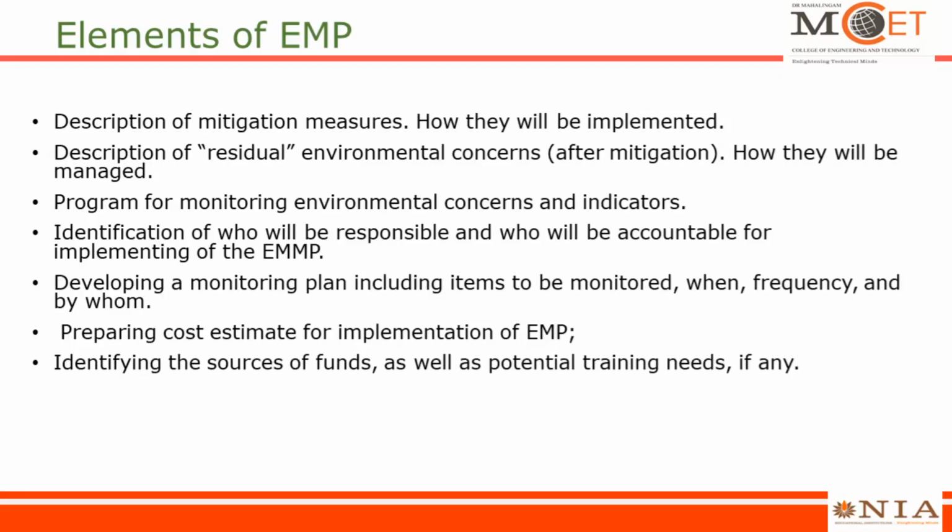Developing a monitoring plan includes items to be monitored, when it is going to be monitored, frequency, that is how often it is going to be monitored, right, once in a week or once in a month, and who is going to monitor it. Preparing cost estimate for implementation of the EMP, and finally identifying the source of funds as well as potential training needs.